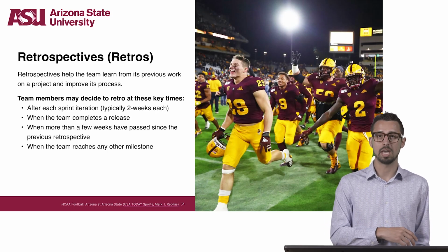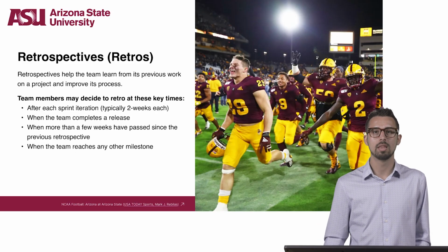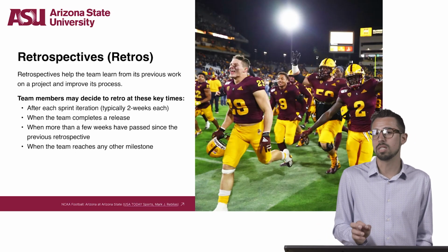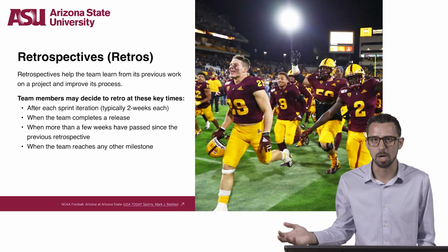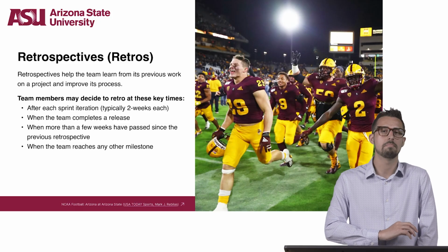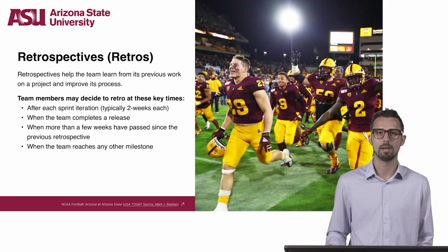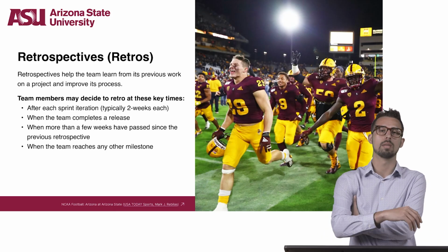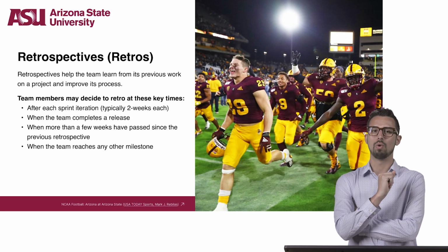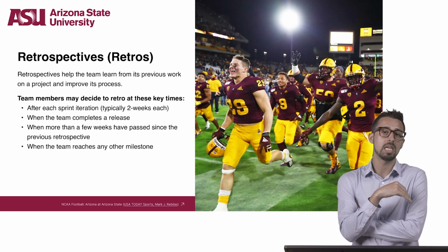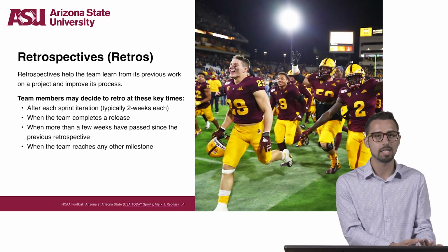The team members can decide to retrospect at any key times. When the team completes a release or ships something, maybe that's a good time to retrospect. It doesn't have to be a monumental increment. It can be any release, no matter how big or how small. When more than a few weeks have passed since the previous retrospective, that might be a good time to retrospect. Or maybe when the team reaches any other significant milestone, take a moment to pause and reflect on that.